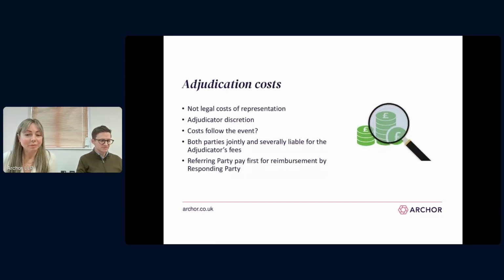Adjudication costs is something I want to cover next. So here I'm talking about the costs of the adjudicator and not each party's legal costs of representation in the adjudication. The parties to an adjudication do not have a right to claim their legal costs of bringing or defending an adjudication unless the parties have expressly agreed this prior to starting the adjudication, which is really rare. So generally, unless it says otherwise, each party bears its own costs in adjudication.